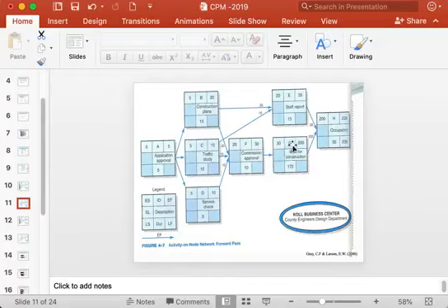Then G can start after 30 days of starting of the project, and G will take its own time of 170 days, and then it will finish after 170 plus 30, 200 time units or 200 days. Okay, and E can finish at the earliest after taking its own time of 15 days and after having waited for 20 days. 20 plus 15, 35 days.